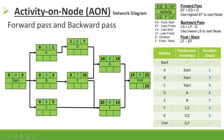Starting the backward pass from the End node: late finish = 15, float = 15 - 15 = 0, late start = 15 - 0 = 15. For G: late finish = 15, float = 15 - 15 = 0, late start = 15 - 5 = 10. For F: late finish = 15, float = 15 - 13 = 2, late start = 15 - 3 = 12.